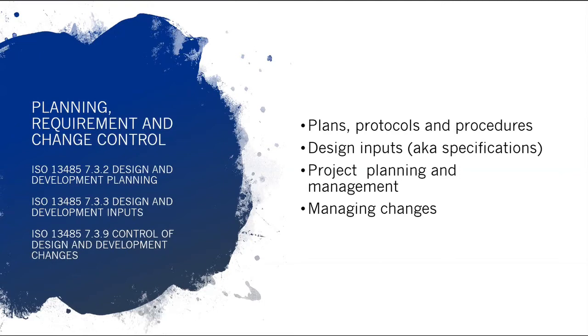And the other dot points, project planning and management. Once again, 60601-1 and 13485 prescribe that you must do these things. So you can't just say, oh, we don't have to worry about project management, we know what we're doing. It's actually called for as a requirement. And change management, also known as configuration control, you need to have a formal process for making sure that as changes occur through the project, be they to the user needs, design inputs, the design as implemented, or the software, all need to be tracked and managed. So you need a very rigorous process.